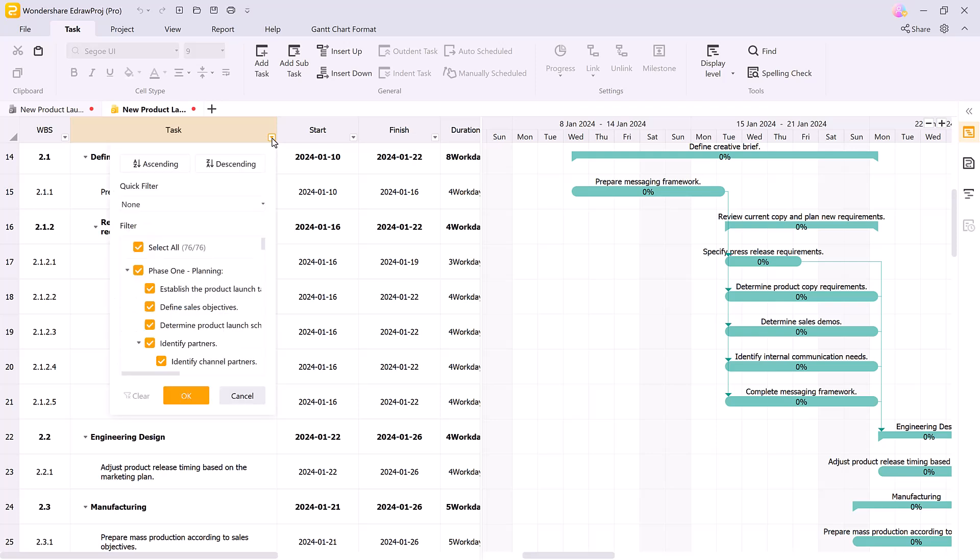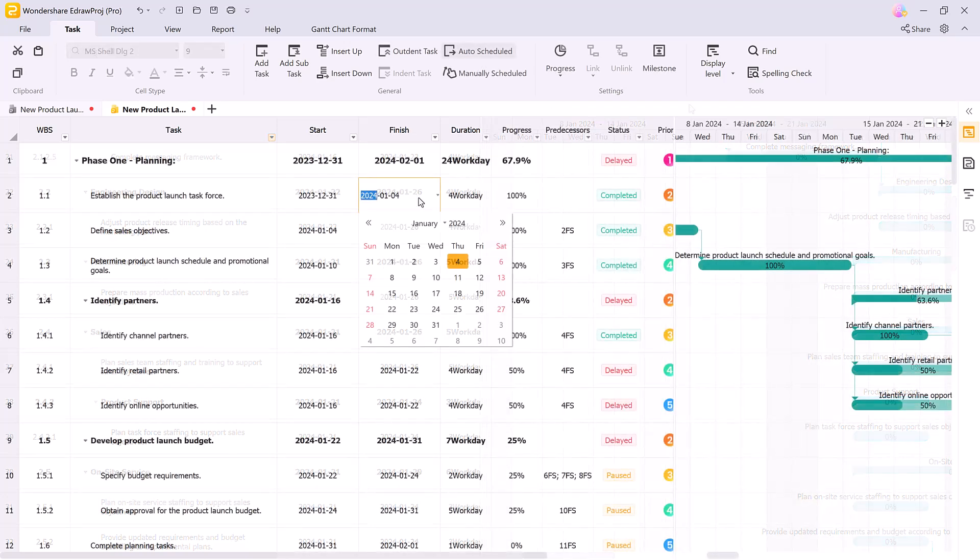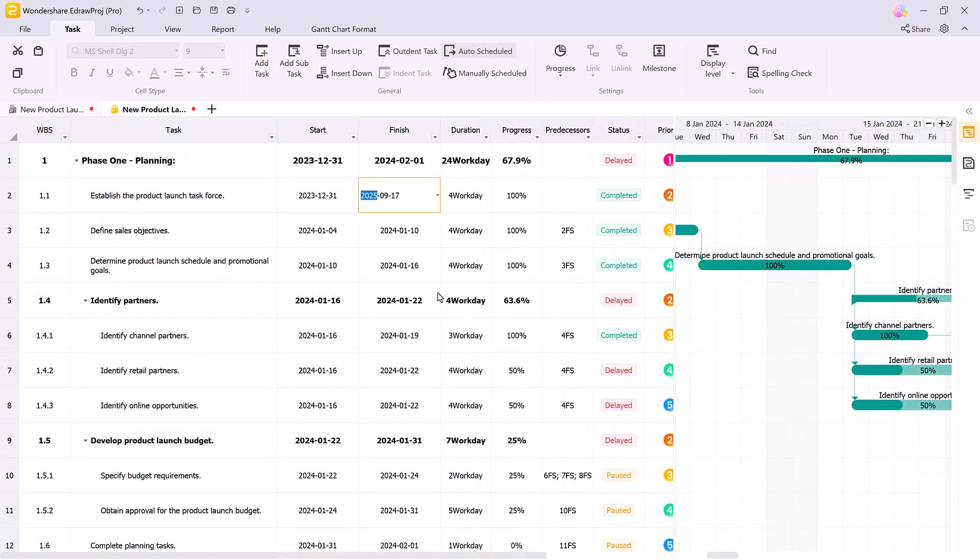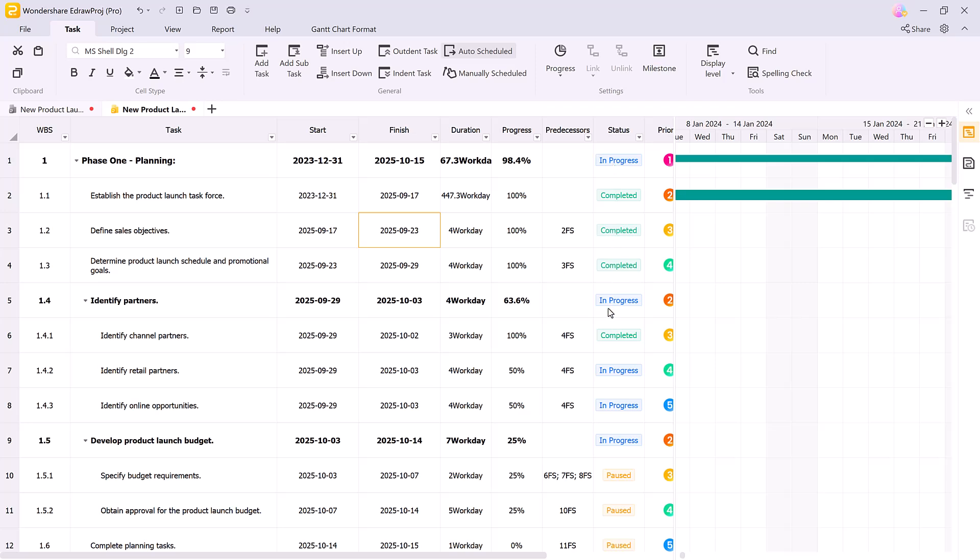You can apply filters to any column depending on what you're tracking, whether it's task duration, priority, or assigned team members. If auto scheduling is on, any updates like changing a task date will automatically adjust the status and progress of linked tasks in the Gantt chart.